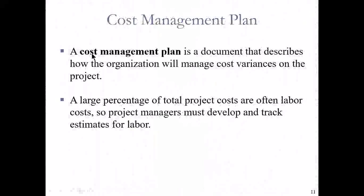The cost management plan is a document that describes how the organization manages cost variances in the project. A large percent of total project costs are often labor costs, so project managers must develop and track estimates for labor. Many people do not include labor — they only forecast what is needed but ignore labor costs. People who are not included in labor programs become demotivated, causing projects to stall, be abandoned, or take very long. Remember, when the project takes very long, the cost goes up. So don't forget to include labor cost.